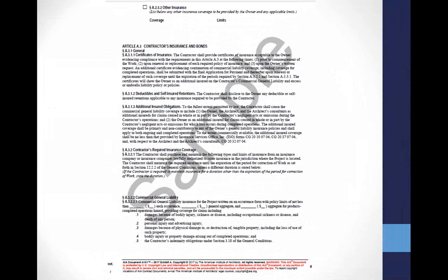If you have an asbestos problem on a project and you cause that plant to shut down while they correct the asbestos problem, you're going to have business interruption. And I know we have industrial folks in the room. Those are things that you probably were considering. One thing I like about this change in AIA is they're actually affirmatively giving you the checklist to consider it. And then it becomes three folks that need to talk about it, at least: estimating, because you need to figure out what your cost is going to be of your project if you estimate by including this, your insurance broker, and possibly your legal counsel. Those are the folks that need to weigh in on it in terms of the selection. The nice thing is that the AIA is recognizing that there are available ways to protect yourself from those risks, and they're giving you that list.